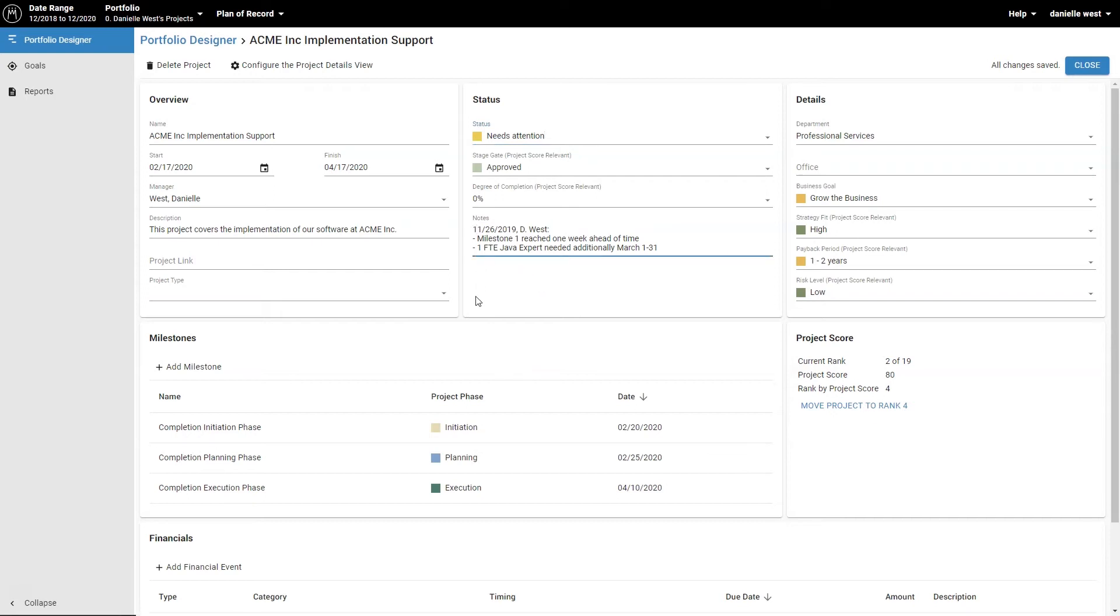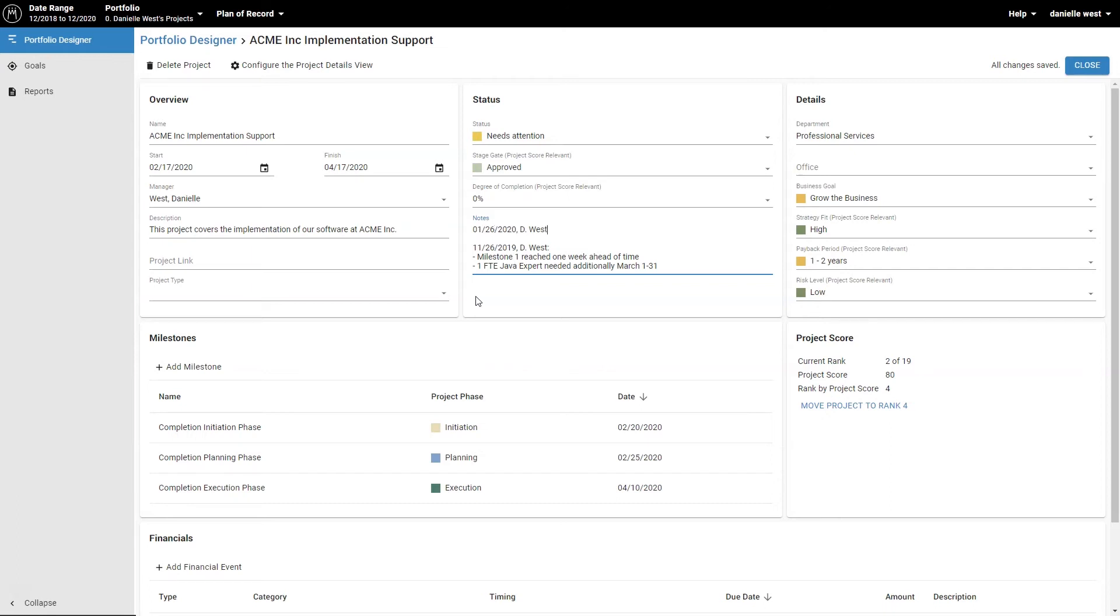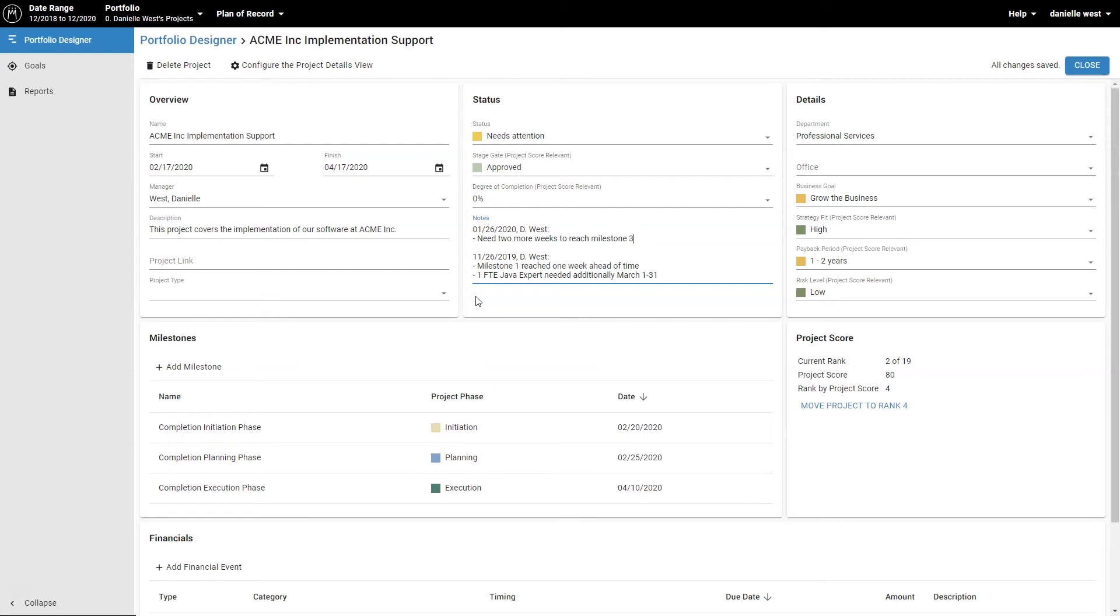In the notes field, enter any change requirements that the portfolio coordinator needs to be informed of. For example, when a project needs additional employees or if the completion date needs to be extended. You can also use the notes field to communicate the expected requirements of a new project during the project planning phase.